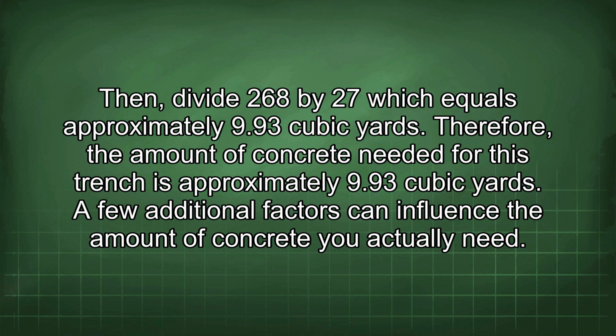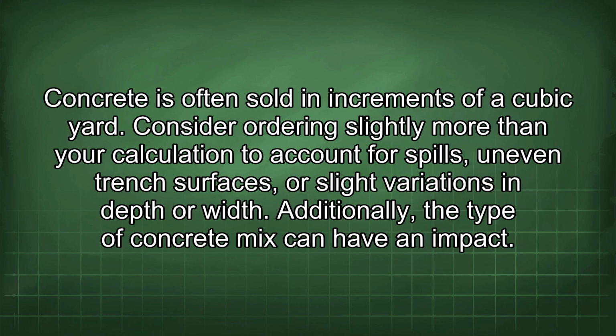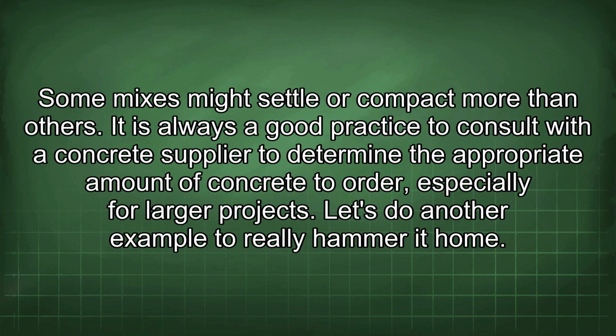A few additional factors can influence the amount of concrete you actually need. Concrete is often sold in increments of a cubic yard. Consider ordering slightly more than your calculation to account for spills, uneven trench surfaces, or slight variations in depth or width. Additionally, the type of concrete mix can have an impact. Some mixes might settle or compact more than others.